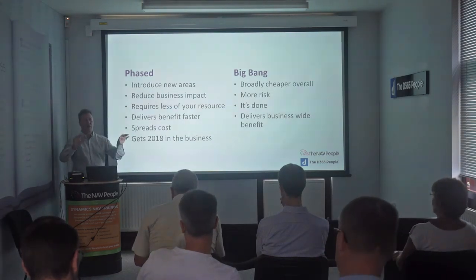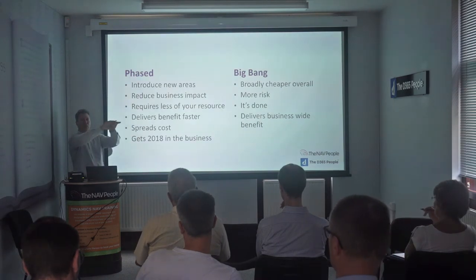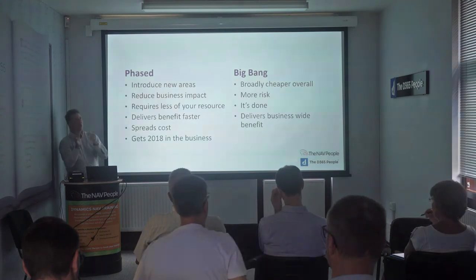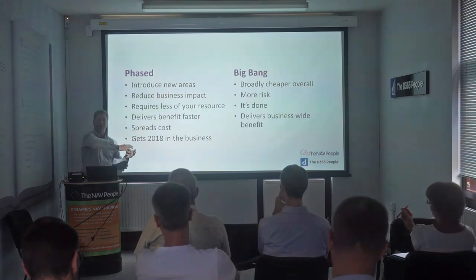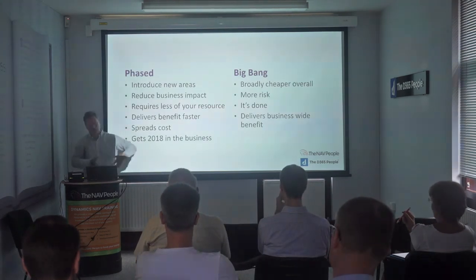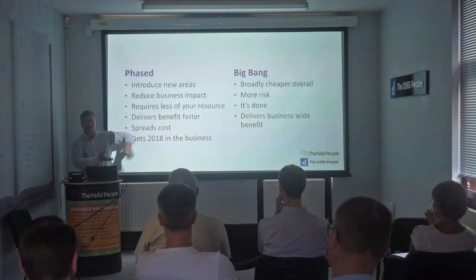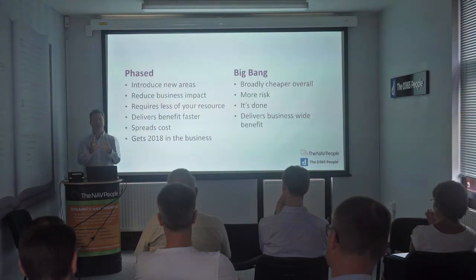If you're a retailer, we're very often changing the back end without changing the till systems in the stores, for example. If you've already got a separate manufacturing system today, but in the future you want to bring that manufacturing system inside NAV, you might go live without the manufacturing system and then bring in the manufacturing system. So a lot of this depends on what you've got today and whether you can reasonably take a portion out.